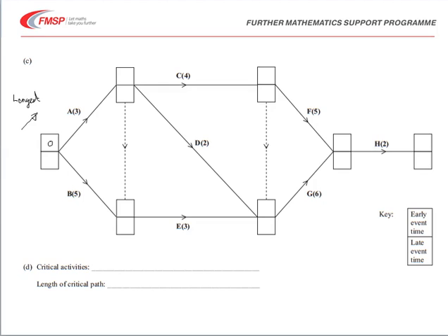So from the start for activity A, there's only the one, so that must be 3 that goes into here. When we're coming down to this event here, we should look at B, which is 5, but also remembering that there's a dummy in there. Now in this case, of course, A is only 3, so the longest path to get to this one is 5.